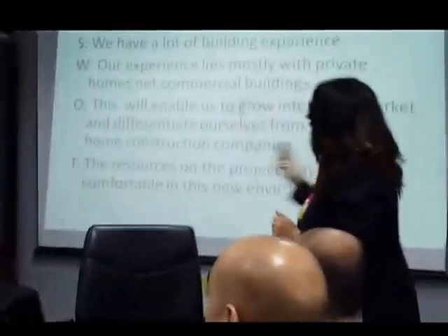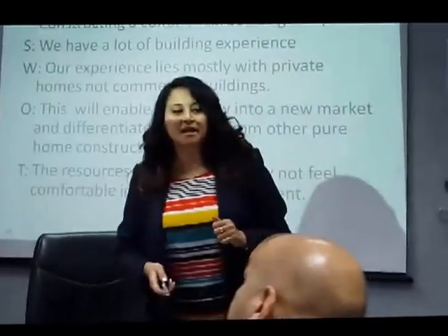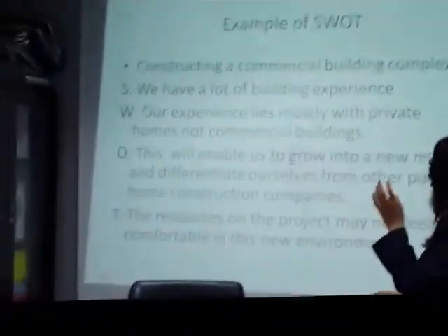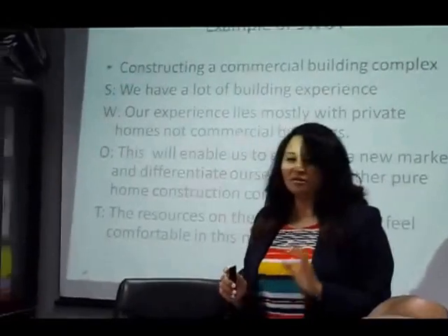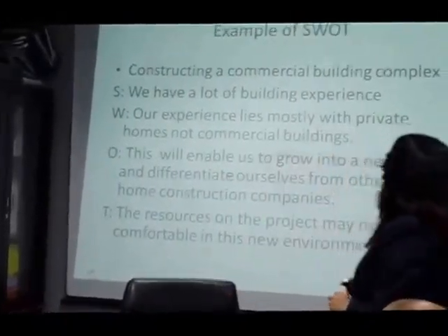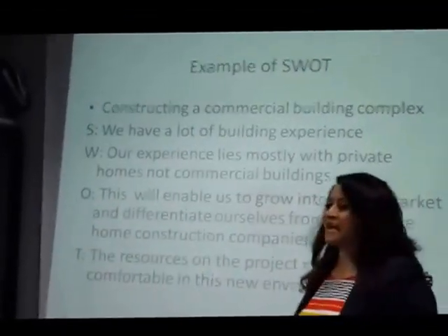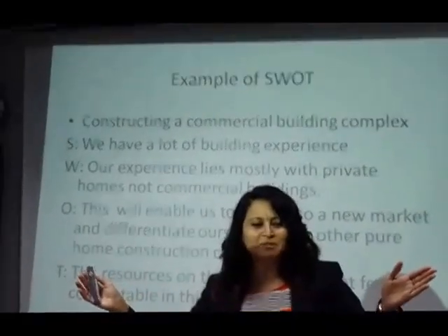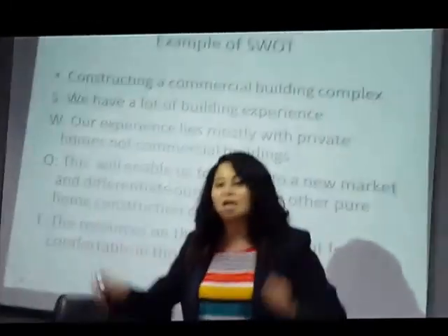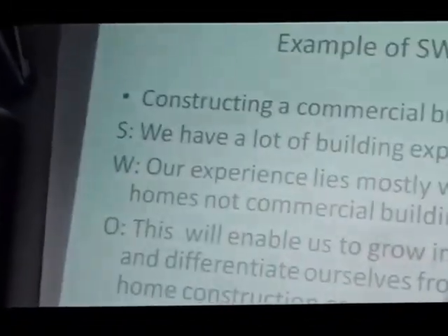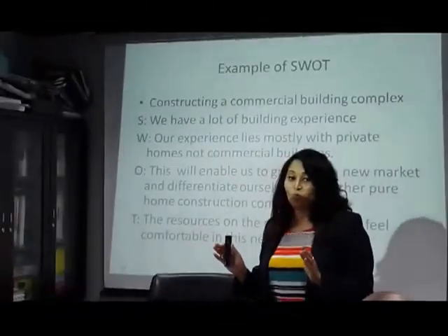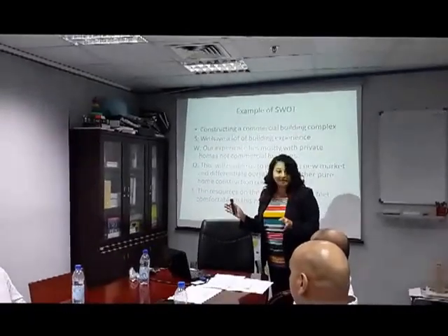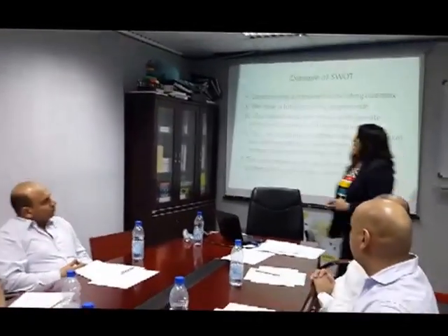Now, an example of the SWOT analysis is constructing a commercial building complex. Let's say I'm an organization. I want to construct a commercial building complex. The strength is you can say, we have a lot of building experience. Strengths, good. The weakness is, but our experience lies in building private homes and not commercial buildings. So this is a weakness.